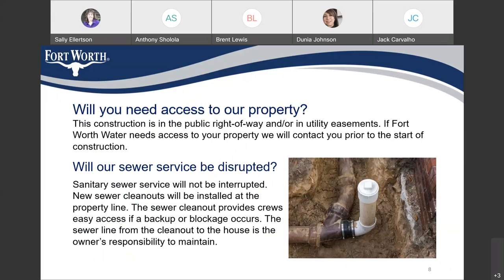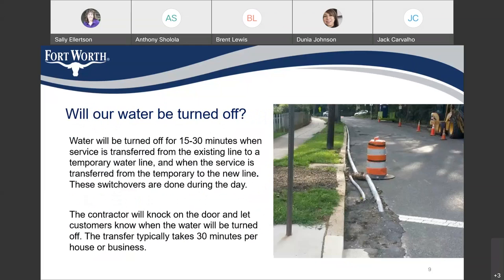The sewer line from the clean out to the house is the owner's responsibility to maintain. Will our water be turned off? Water will be turned off for 15 to 30 minutes when service is transferred from the existing line to a temporary water line, and when the service is transferred from the temporary to the new line. These switchovers are done during the day. The contractor will knock on the door and let customers know when the water will be turned off. The transfer typically takes 30 minutes per house or business.